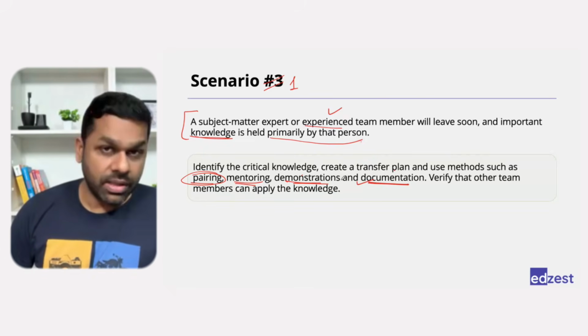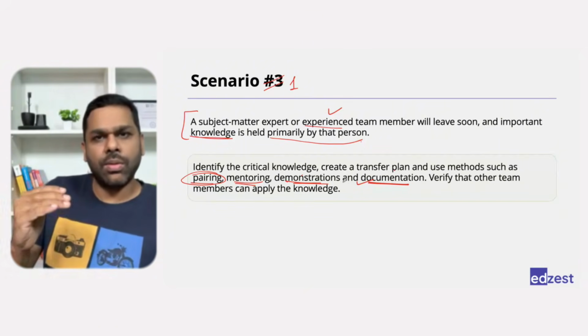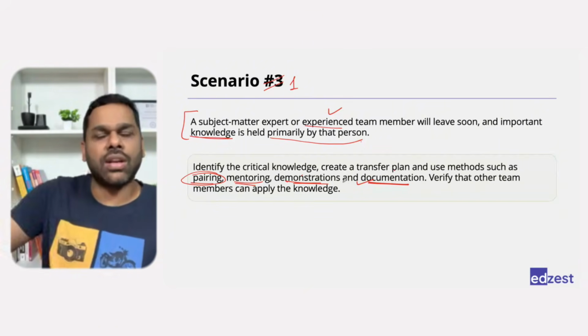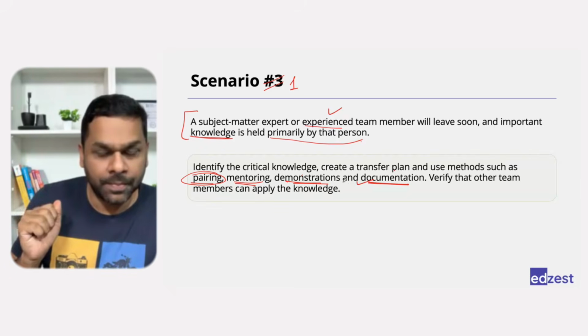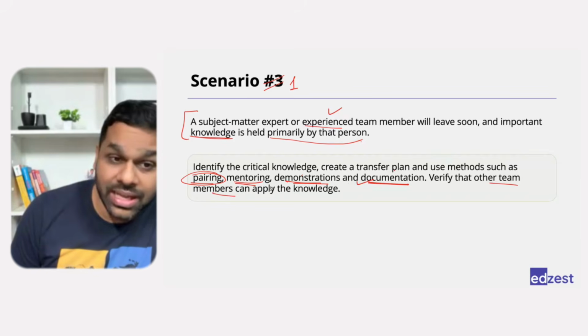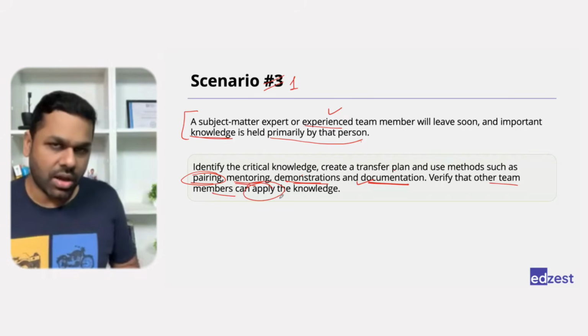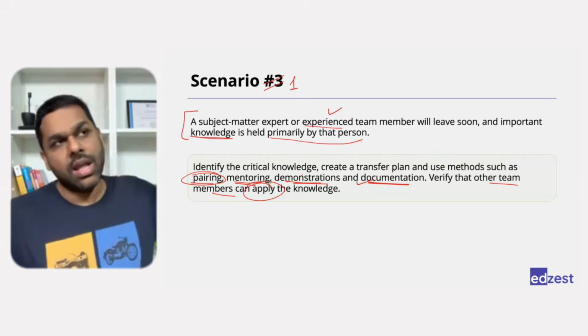So use that notice period well. Ensure that people are working with them, seeing what they are doing. Everything should be captured. This way you will be able to improve the chances that you're capturing maximum knowledge. Okay. Also verify that other team members are able to understand and they can apply the knowledge. And not just understand it, but also apply the knowledge. So we'll have to verify it.